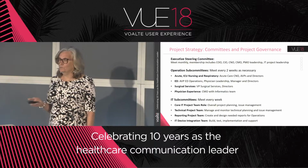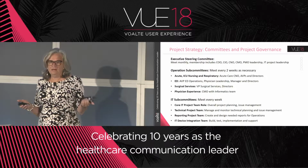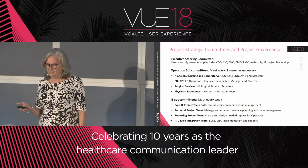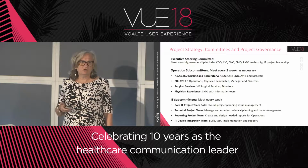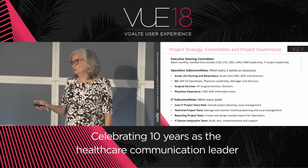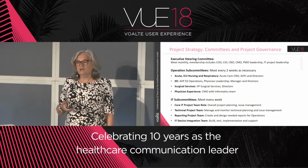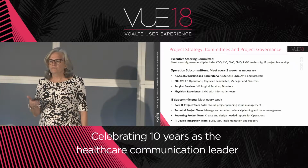IT subcommittee, we meet weekly. We have the core project team that Vocera connects all get together and we plan and go through our project management and our issues. We also have the technical project team that separate with Vocera, and they set everything up to make sure everything's working right. And we actually have our reporting team since the beginning. They had already created nurse call reports, so it's really important that the change that we made into Vocera matched or was similar to the information they were receiving before about the nurse call. So they were a part of our testing to make sure everything worked correctly. So it's really important to engage your reporting team right away.